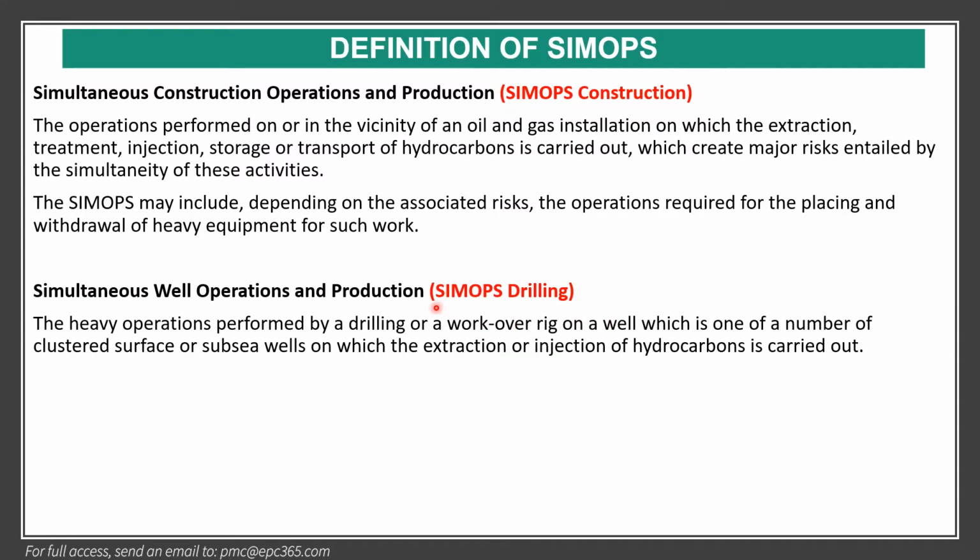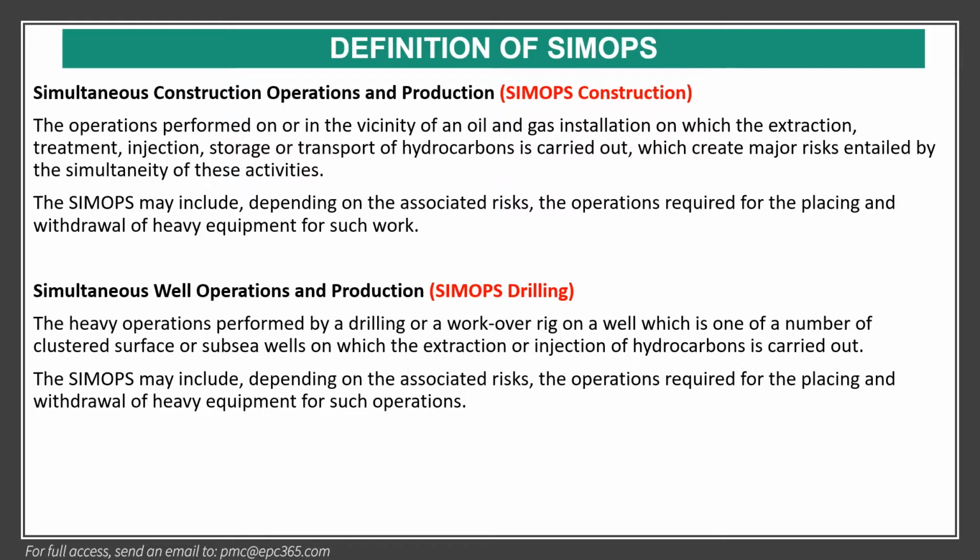Then SIMOPS drilling means the heavy operation performed by a drilling or workover rig on a well, which is one of a number of clustered surface or subsea wells on which the extraction or injection of hydrocarbon is carried out. The SIMOPS may include, depending on the associated risk, the operations required for the placing and withdrawal of heavy equipment for such operations.